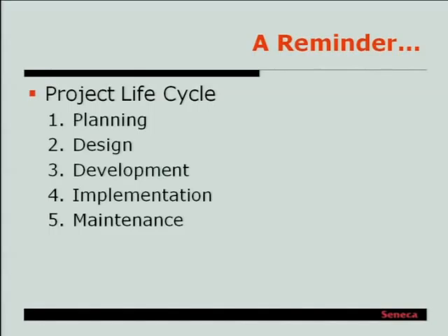So you start with your planning. That includes your research and your analysis, sometimes a needs analysis or a feasibility study. Then you go on to designing what it is you're actually going to create, creating it on paper or virtually before you actually start building anything. Then in the building phase, we also call that development. Then we get into implementation, where we deliver, we publish, we distribute, we get it out there in front of the users. And the last phase, which is often forgotten, is the maintenance phase. How do we finalize our project? What do we do after we've delivered it, after we've shipped it?